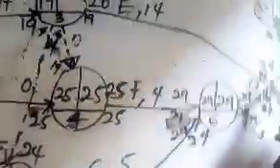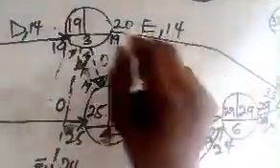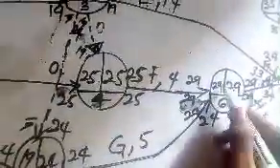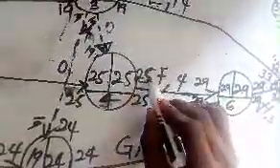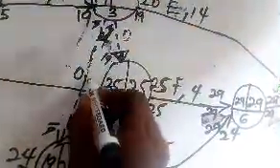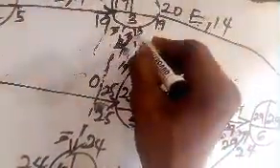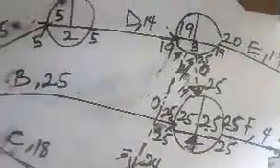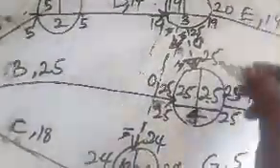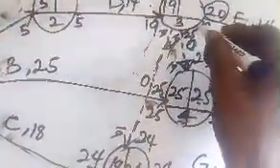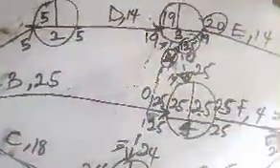So I come back to this other portion, which is 34. 34 minus 14, 20. Now, that is for this 20. Now we come to this last portion, we have this 29 minus 4, 25. 25 entered, and 25 will come out where? Here and here. So 25 minus 0 will be what? 25 here. And 25 minus 0. So you can see on this node we have 20, we have 25, and we have 24 when going back.